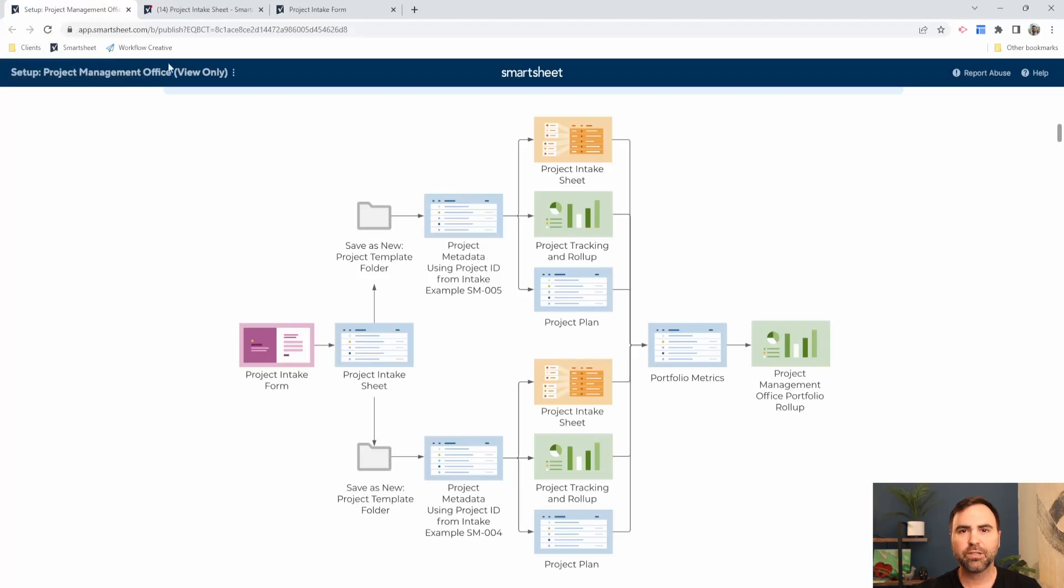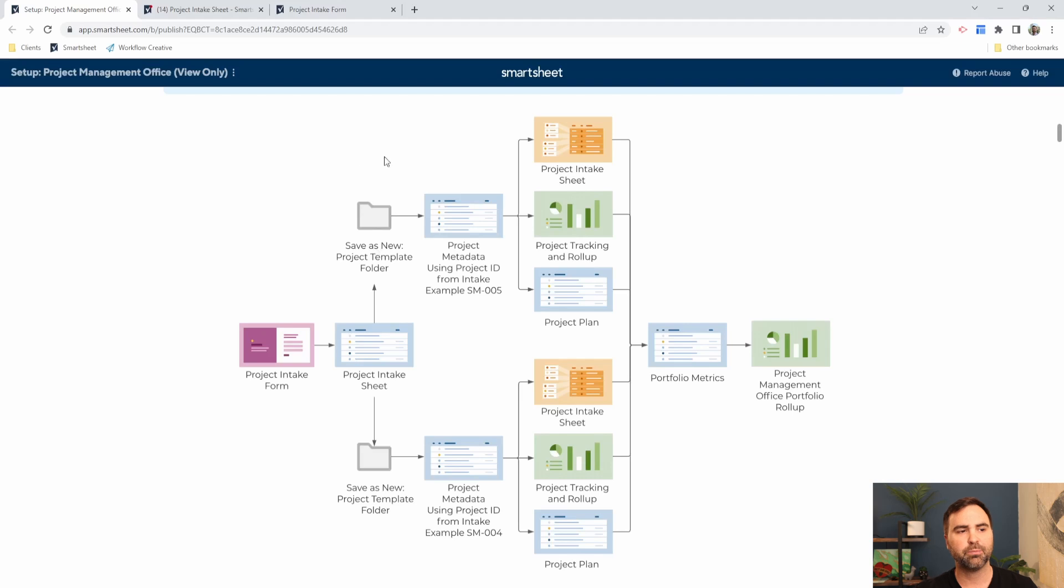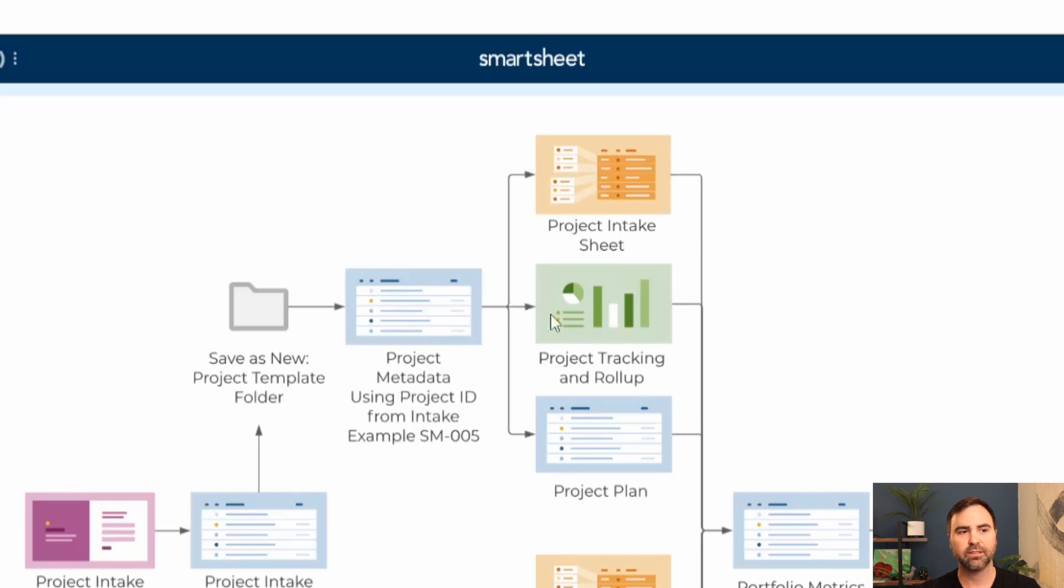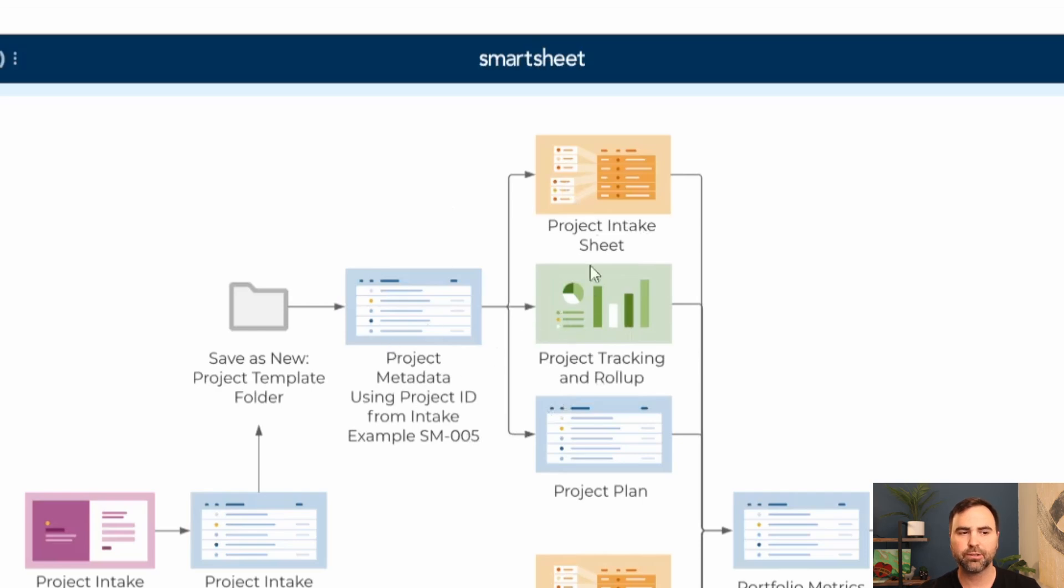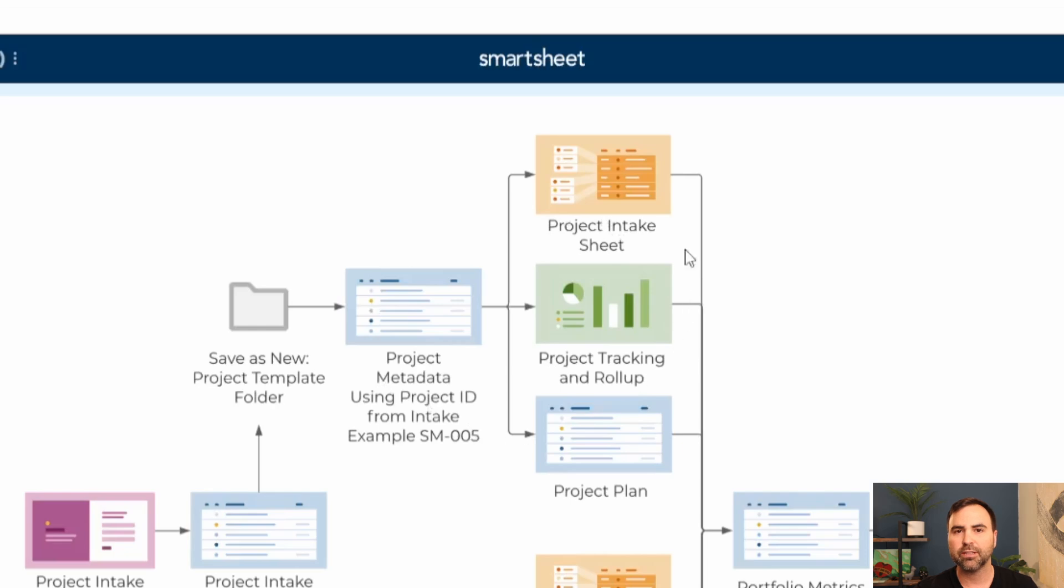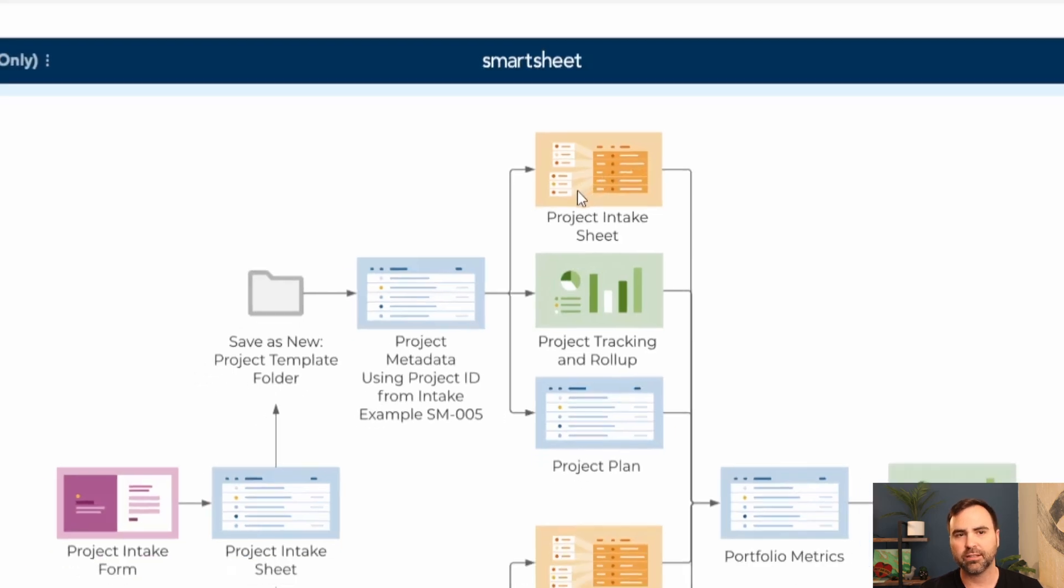Once that project is approved here on our intake sheet, we're going to provision that project. Provisioning a project means that we can take a template set like this that has all of these Smartsheet assets, sheets, dashboards and reports, and we can create new projects with that same structure without having to create these individually. Depending on your level of Smartsheet, there is a premium application called Control Center that will spin this up for us. If your level of access doesn't have Control Center, then we can do this manually with just a simple right click.